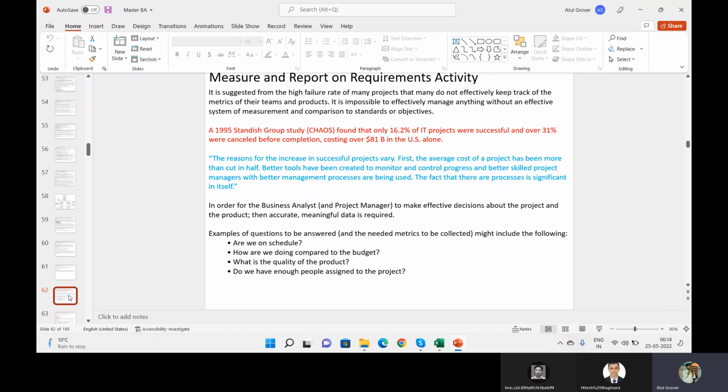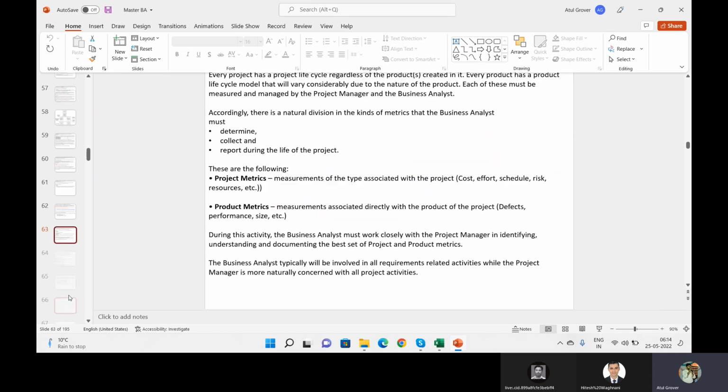Risk allocation, or risk mitigation as well. But if you raise a risk on day one and after 6 months you're still on the same path, on the same row on that risk, it means it is a problem for the upcoming days.